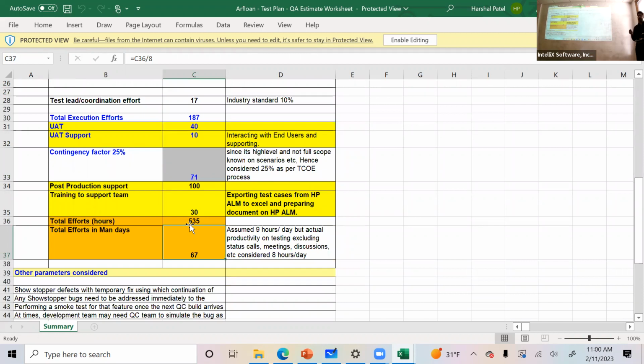So there is some logic behind it, right? So there is some confidence level that, hey, I can track it. If I'm missing any of those things, or I'm spending a lot of time doing certain things, then I can talk with my project manager and my users and say, this is the impact. Remember what we talked about as you go through it. Yeah, I'm going to do this testing, but I can do that only after the code is available, right? So I gave you a 13-week timeline with the assumption that the code will be available by this date. And if it is not, what is the shift? Right? That's the conversation you have, because they're going to ask, okay, how long is it going to shift?